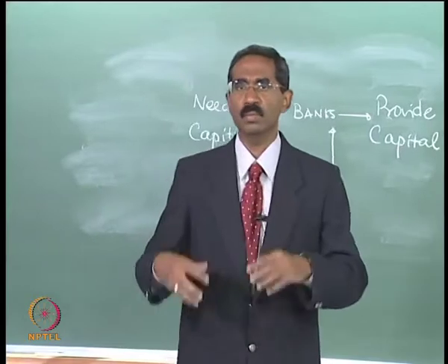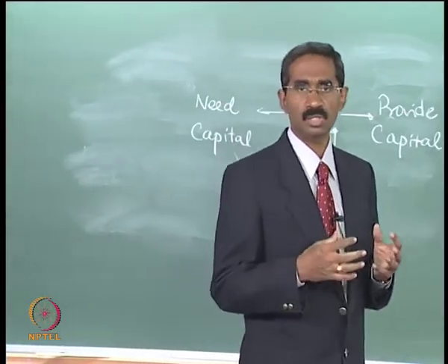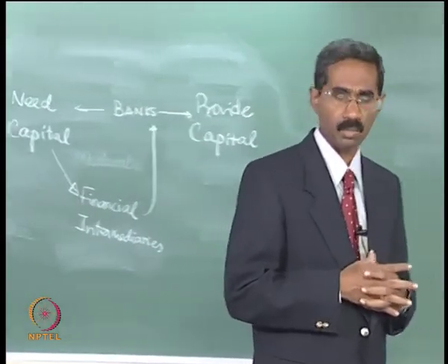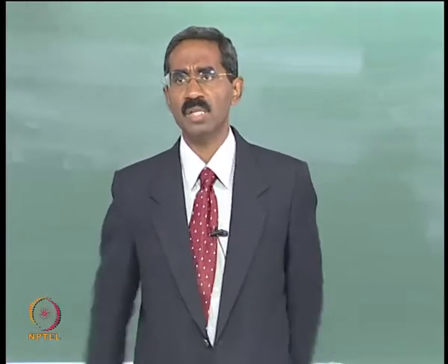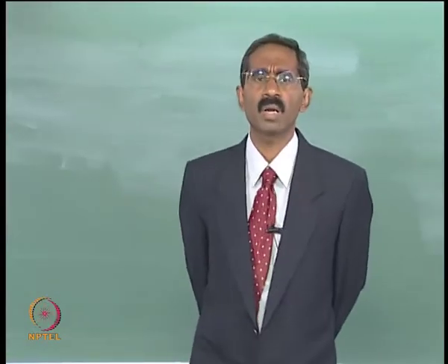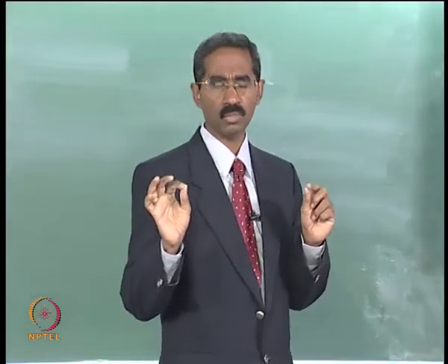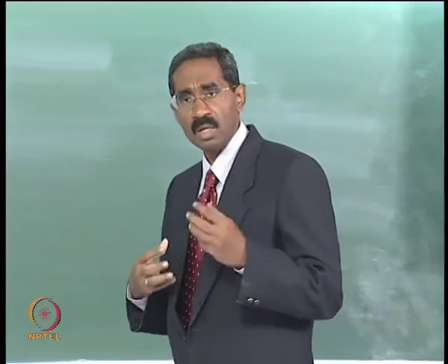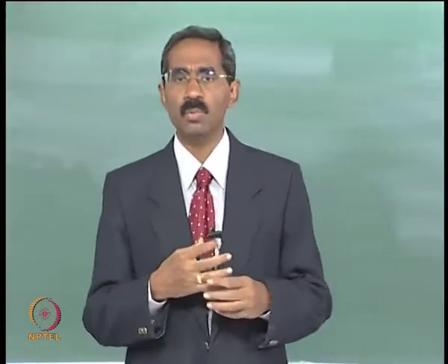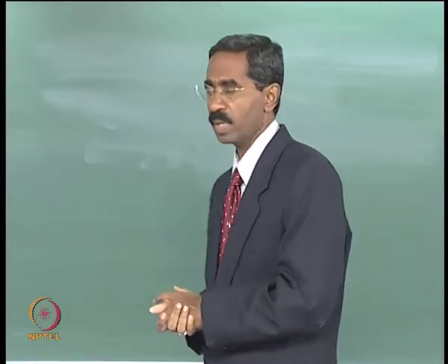Once we have crossed that stage, the next would be to prepare what is called the project information memorandum. The project information memorandum will talk about the entire project details. Essentially this is a memorandum that is circulated to the lenders. So the targeted readers would be the potential lenders who are going to invest in this project, and the information that would be of interest to the lenders will be put together in the project information memorandum.